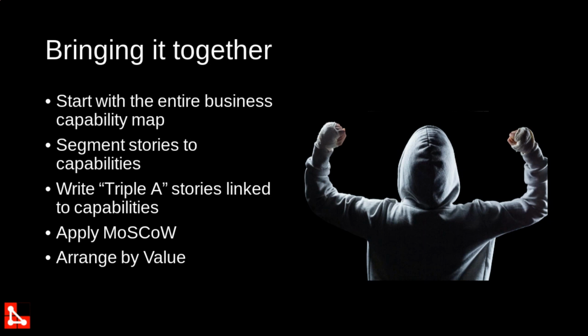We call it contingency in a project. So I'm going to ask you to budget for so much contingency because there's simply not enough room to play between the should-haves and the could-haves. Right. Now, this is also very important if you're dealing with your own requirements. It's very difficult to say, oh, but I'm expecting everything and I'm okay to let some things go.